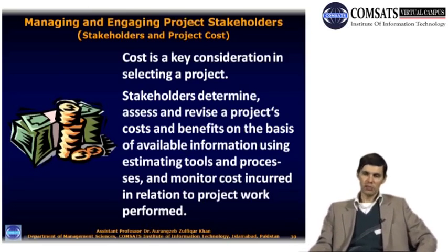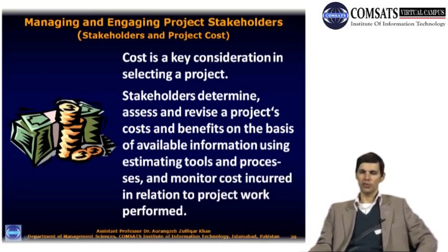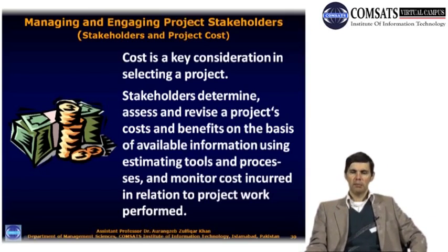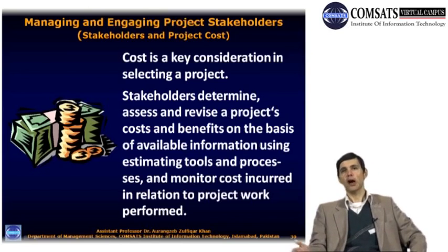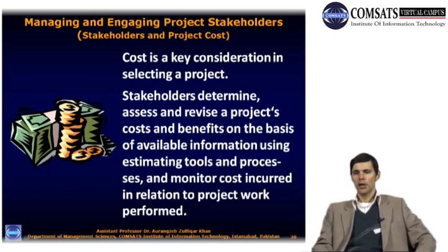Now, if you studied project cost management, you'll know that there are quite a large number of estimating tools, top-down, bottom-up, and so forth, which give varying degrees of accuracy with regards to estimating the cost of a project. Plenty of tools. And of course, the cost has to be monitored, how much cost has been incurred and how much work has been performed for that cost. There are also tools for that, earned value, and so forth.